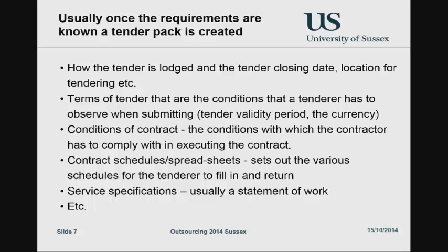Circumstances, particularly with large consultancies, they will try whatever way possible to get past the contract manager and the bid managers in order to speak to senior management to sell their wares and to try and get advantage. And this is tightly controlled, usually, in formal processes, particularly in the public sector. You are not allowed to speak to anyone else other than usually the procurement officer who's handling this. It's to control this sort of opportunistic behaviour that we talked about before.